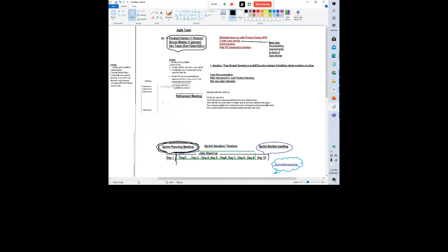And then the Scrum Master organizes the refinement meeting. The product owner asks the Scrum Master to organize the refinement meeting with the team, so that they will be getting ready for the sprint or delivery. In that refinement meeting, the product owner goes over each user story, and the team identifies and discusses all the questions they have related to that user story.